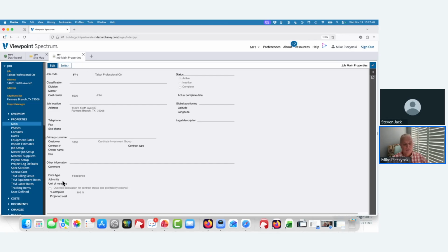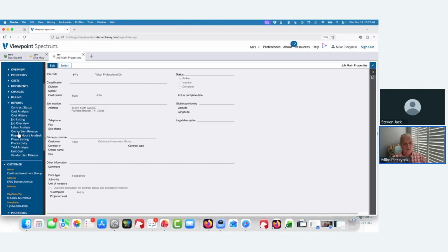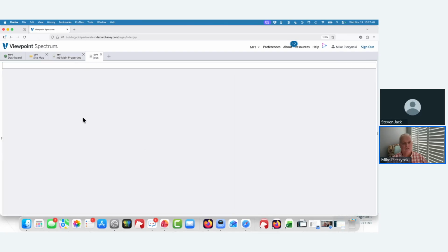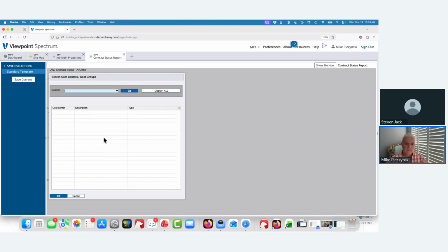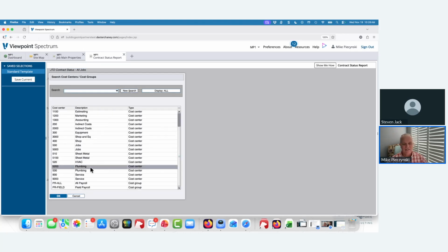And then what does that do for us? Well, if we were to run down under reports to the contract status report that we've all come to know and love, now I can run my contract status report for everybody, for a whole bucket of everything in the company. Or I can say, hey, just how's my plumbing department doing? I want to know about their jobs, their gross profit, the trending, and maybe most important, what the backlog in plumbing looks like. Same thing with HVAC or sheet metal or jobs. I can now get profitability and backlog for each one individually or group them up to compare and contrast. Maybe I've got sheet metal across different locations. Now I can compare and contrast: how's my sheet metal doing as a whole versus by location, compared to plumbing, compared to job costs or jobs.